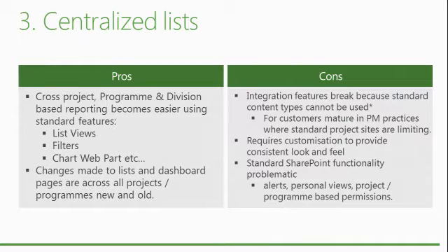And you lose other key functionality that you might expect from Project Server out of the box. In versions 1 and 2 of our deployment approaches, if you set an alert or a personal view, it would be based on that project and that project alone. Of course, in this scenario of a centralized list, if you get an alert when someone's added something to the risk list, you're actually getting an alert on any of those projects that anyone has created, which is horrible.